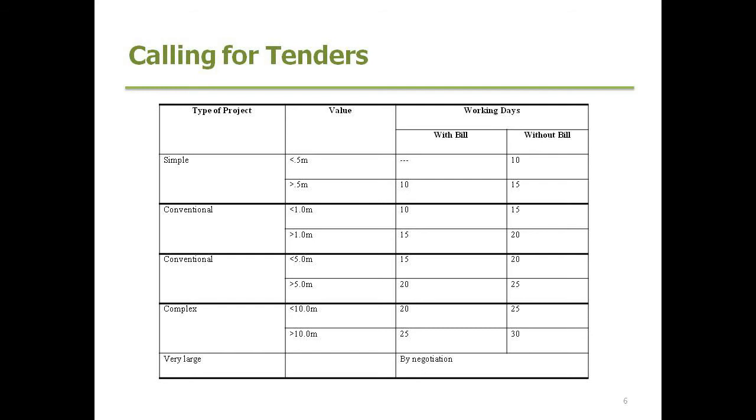The other issue here with calling for tenders is again deciding on the number of tenders, particularly on specialty projects, and the amount of resources that will be available at the time when you're calling the tender, to have all those points very clear before going out to tender. Nothing worse than calling a tender and having one price come back conforming. So it's very important. Once you get a number of tenders coming back conforming, then you can consider it successful. Once you go through the evaluation process, you've done your matrix, again, then you can look at real comparison of pricing and whether we're getting value for money on this project.